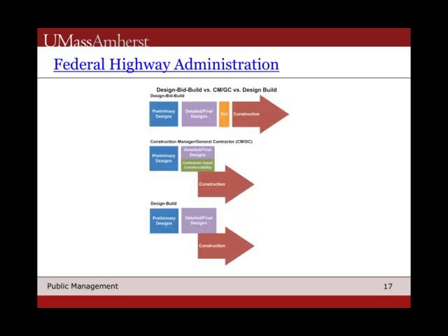The Federal Highway Administration here in the U.S. has much the same type of process here. You can see there's design-build versus just the design itself. In a design-build, the construction is done by the same people who do the design, whereas in design-bid-build, where the design and the build are separate, it's going to look different. So again, a project is a one-time episode or process that has these milestones along the way, and you can break down the overall work process into discrete functions that have a discrete deliverable at the end.